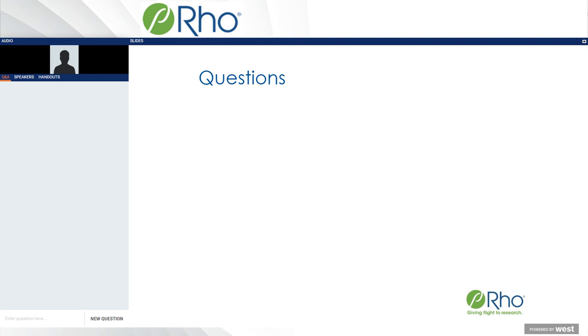All right, thank you. So our next question here, how do you determine if a site will be able to sufficiently enroll your study if they're running other competitive studies? So thank you. This is Becky again. We touched on this a little bit. It is always very important to make sure that you are asking questions of the site during the qualification and feasibility stage. How many competing trials they are running currently, and then providing them with the time frame that you anticipate your study will enroll and what they have planned.